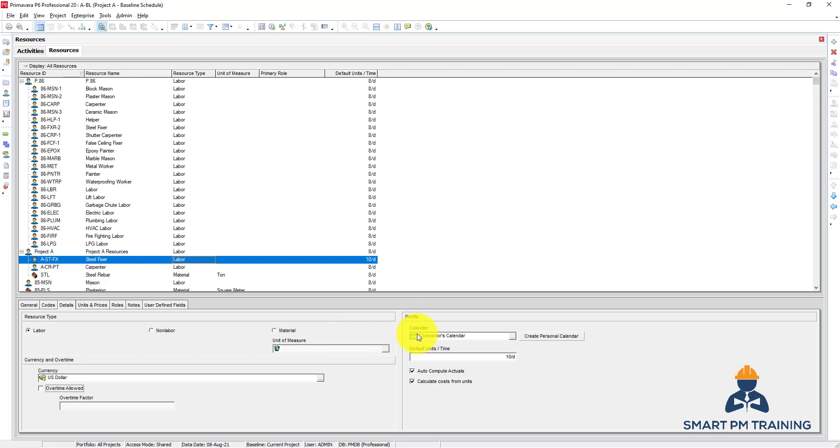The Profile, the calendar. The calendars we created in the project - you remember we created contractor's calendar. So you can change the calendar if you want and it will reflect on the resources usage profile, so the availability and unavailability based on the resource calendar as well.